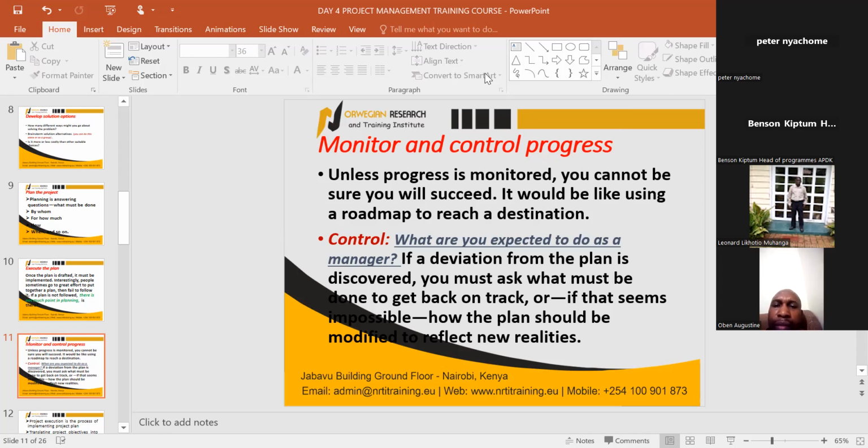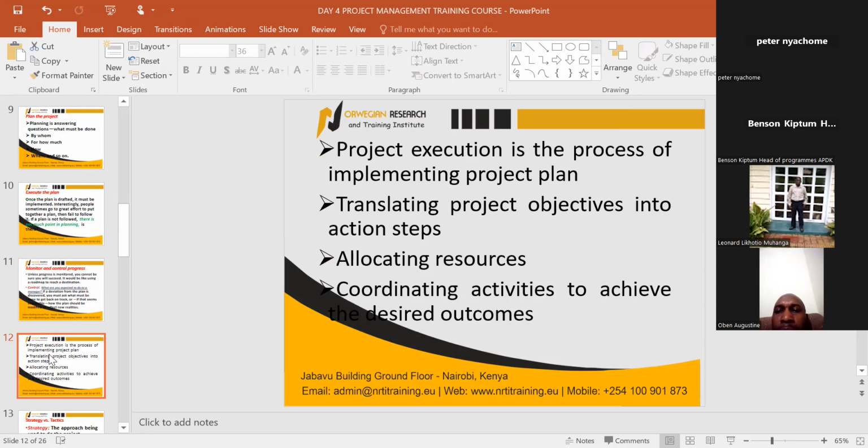Yeah, projects are done by contractors. Don't expect a contractor, after a final agreement on the cost that is supposed to be paid, to use his own money to deliver what was not initially there in the plan. Where will the contractor get the money? So you must add an additional amount for the change that you're requesting. And that's only possible by modifying the plan. Control and monitoring of progress will make us able to do such changes.